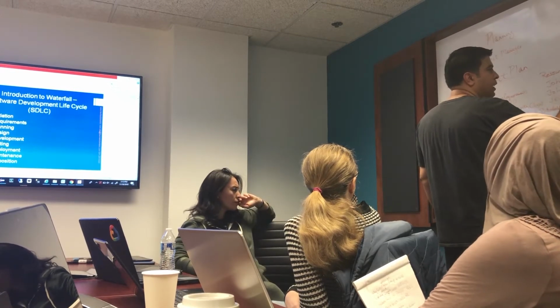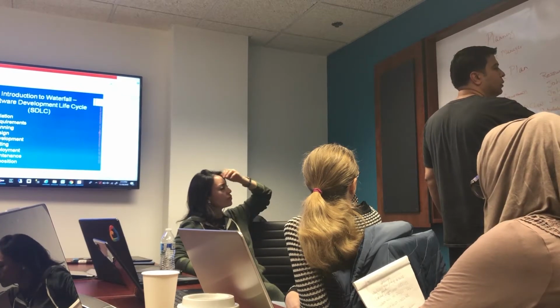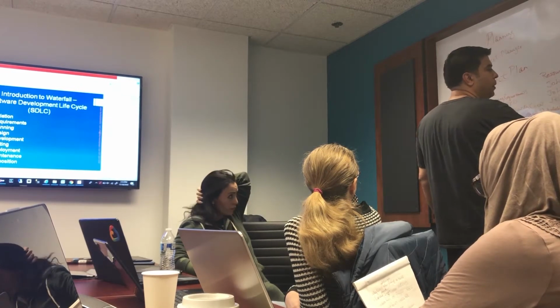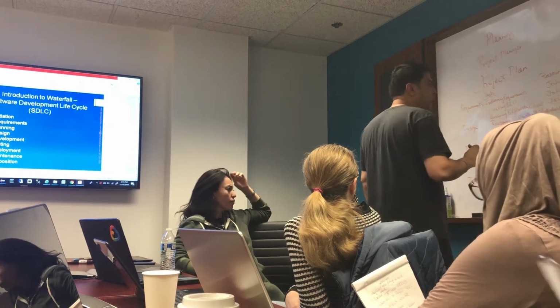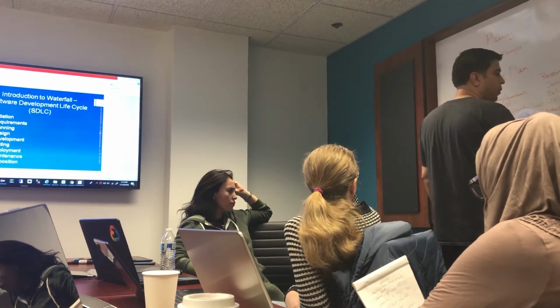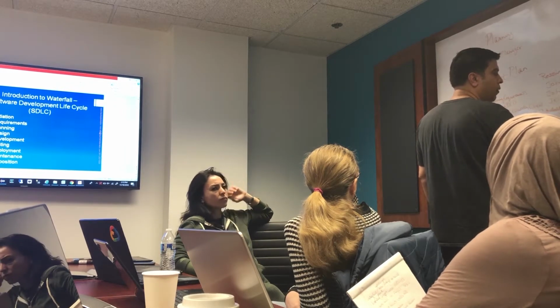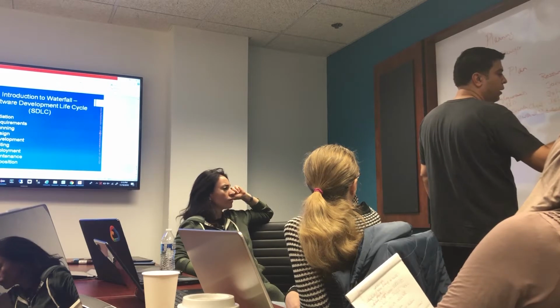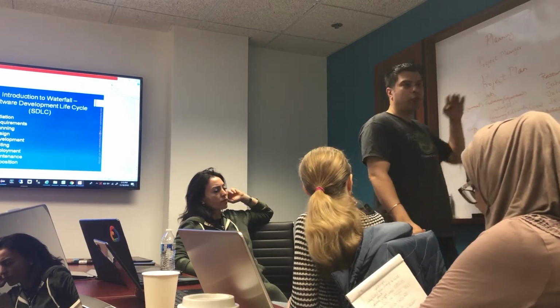So instead of 3 weeks, we'll put everything in days. So 15 days. 5 days. Remember, there are only 5 working days. Reviewing BRD with all stakeholders will be 3 days. Or 5 days, just to get clarity. Okay? So this is how a project plan is created.